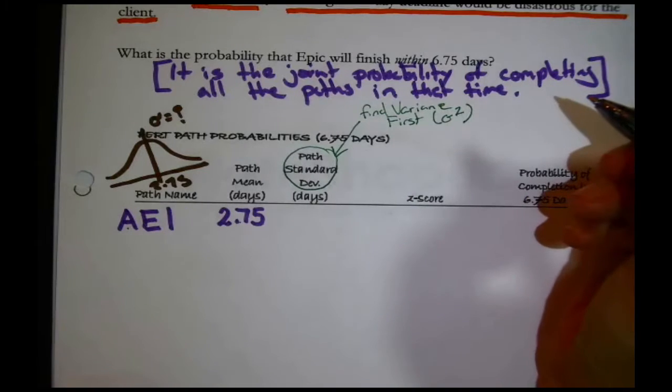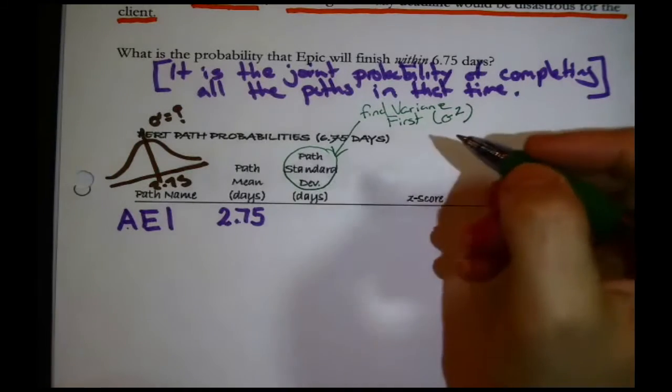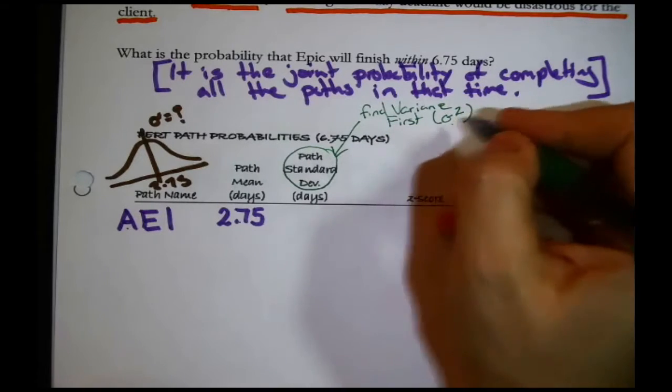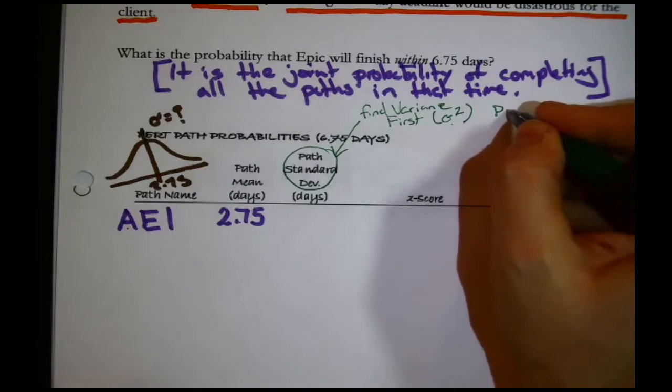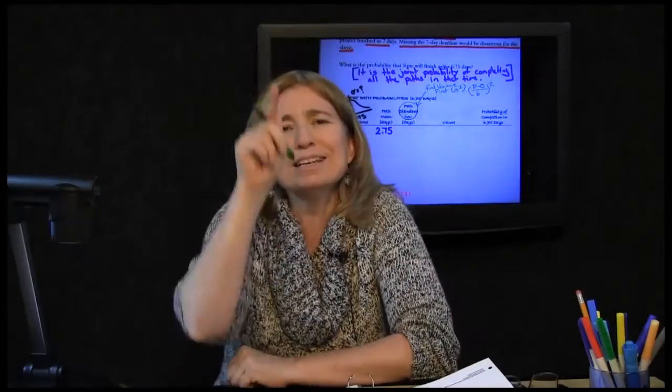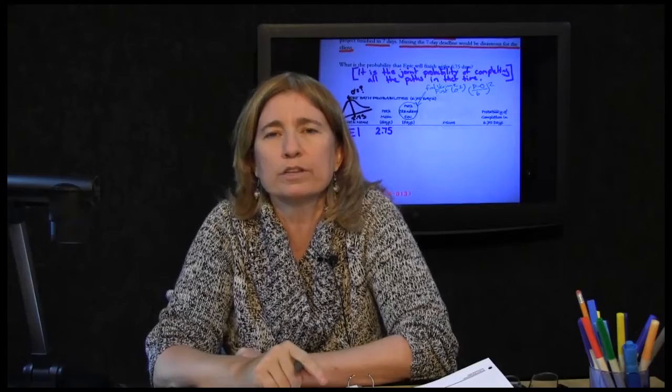How am I supposed to do that? Remember back from scenario 3A that we calculated variances because they were the pessimistic time minus the optimistic time divided by 6, squared. And we did that for each and every one of the tasks. And then we wound up back then not using that information, but we said, we'll store that because we may be able to use it later. Now is the time to use that information.